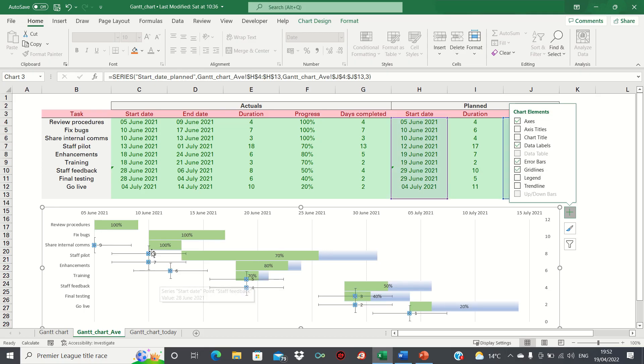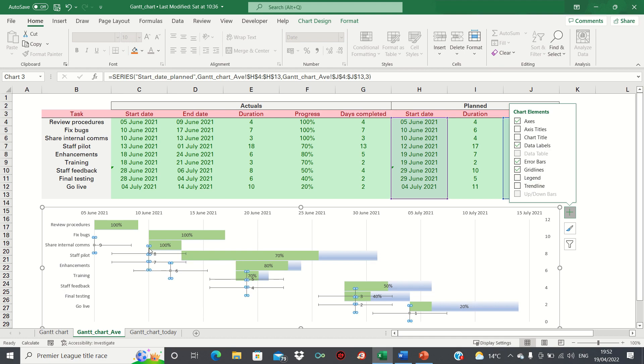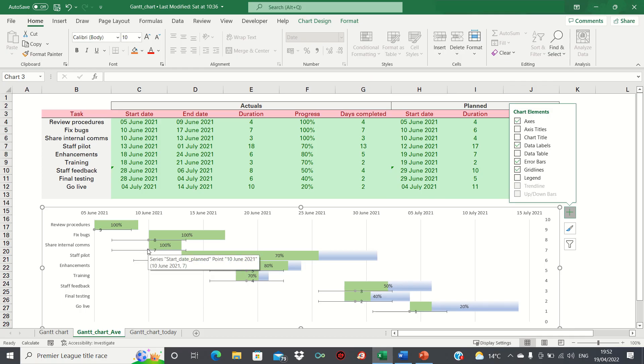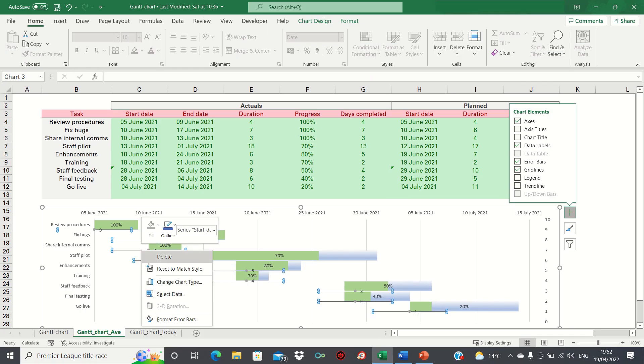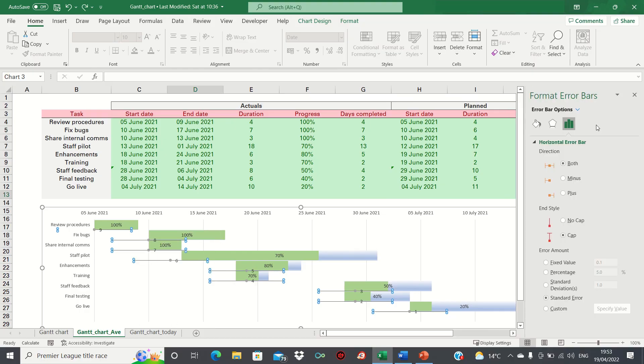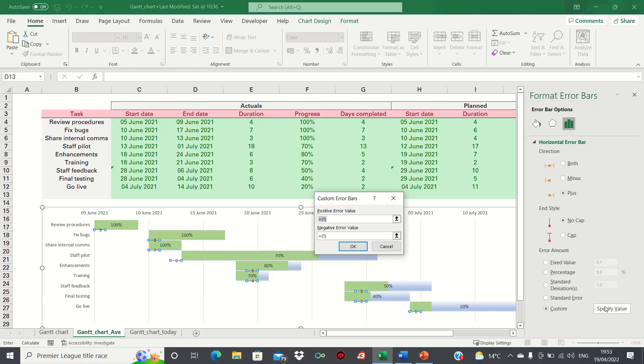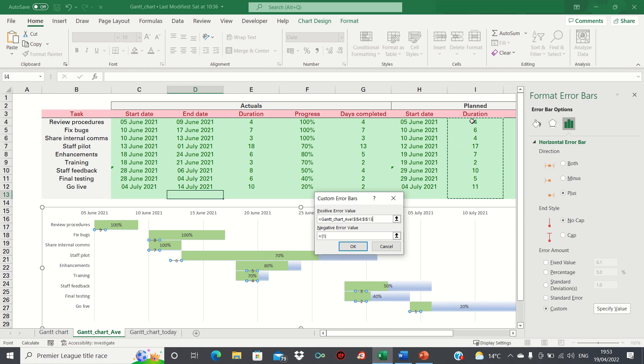We can remove the vertical error bars by selecting them and then deleting them. Let's now format the horizontal error bars by right clicking them and clicking format error bars. We're going to select plus for the direction and no cap for the end style. We'll also select custom for the error amount. Here we'll select the duration column for the positive error value and we'll leave the negative error value blank and click OK.